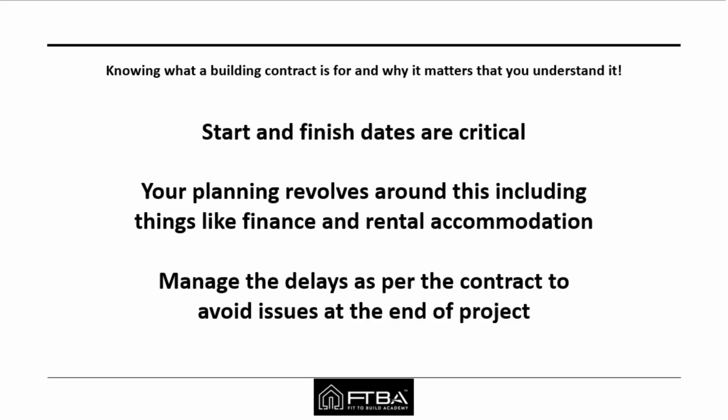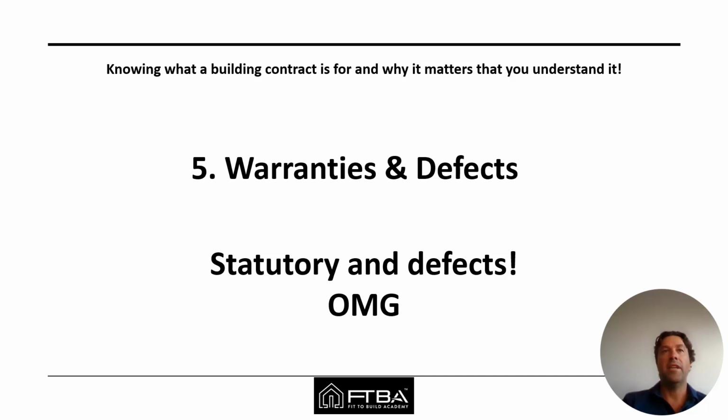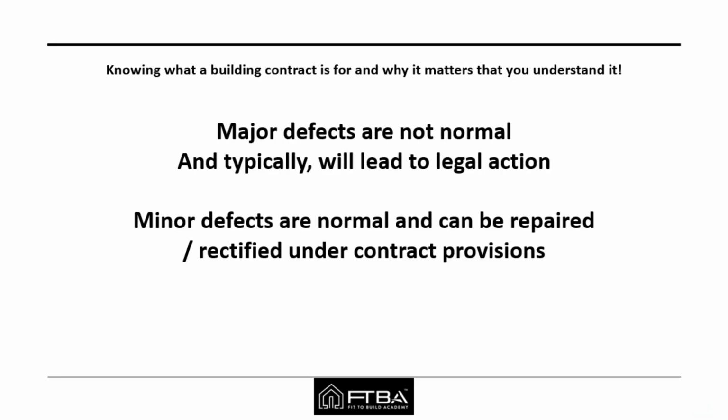which could cause you financial loss, such as additional rent that you need to pay. And understanding terms such as liquidated damages and what they mean and how they are implemented is critical. Warranties and defects. If there's no bigger trigger word in building, it's the word defects. It conjures up so many images, and at its worst, defects can be so bad that major rectification works can be required, which will cause financial loss for the builder and most likely the client. No matter how good your lawyers are, it's going to cost you something.